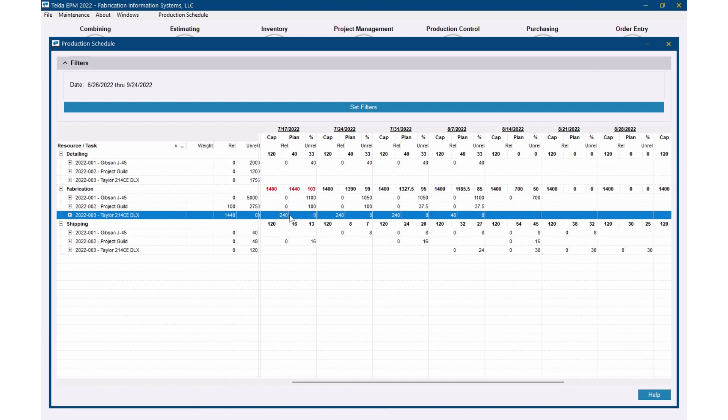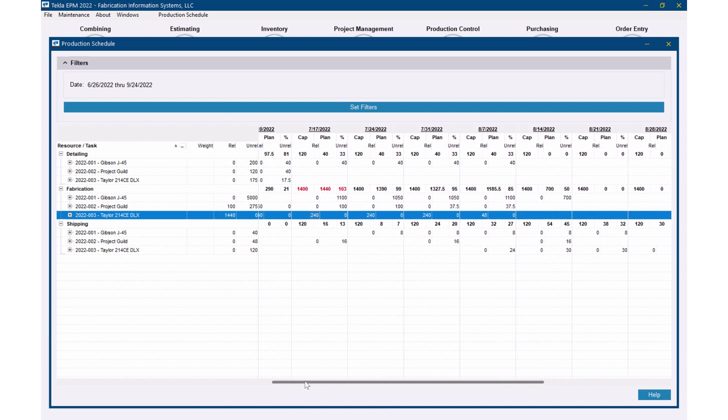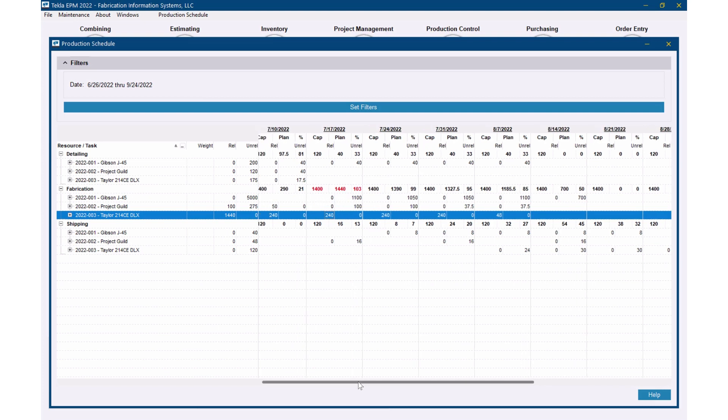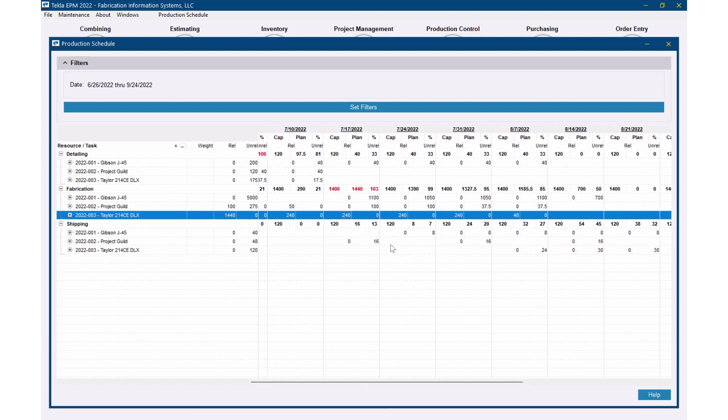But 1,100 hours here, 100 here. So let's say I want to level this out. I could go back to the project schedule if I wanted to and start moving dates around to level this out a little bit. And I actually want to pull some of these hours up into this week since I have a little bit of capacity here. So if I want to pull some of these hours up, I could go back to project schedule and change those dates, but we can do that here as well.